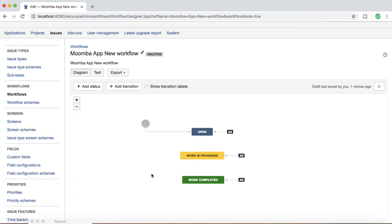Transitions basically describe how an issue moves from one state to another — that's the second key component. The third key component of a workflow is Assignee, which says who is responsible for a particular issue when they are working on it. In a common software development project, if a story or task is picked by a developer, the assignee is that developer. Assignees can be assigned automatically through the workflow setup.